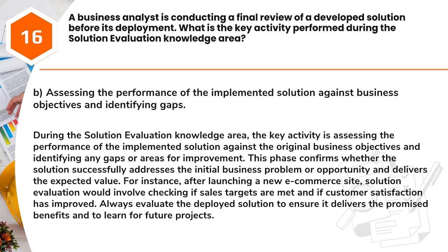During the solution evaluation knowledge area, the key activity is assessing the performance of the implemented solution against the original business objectives and identifying any gaps or areas for improvement. This phase confirms whether the solution successfully addresses the initial business problem or opportunity and delivers the expected value. For instance, after launching a new e-commerce site, solution evaluation would involve checking if sales targets are met and if customer satisfaction has improved. Always evaluate the deployed solution to ensure it delivers the promised benefits and to learn for future projects.